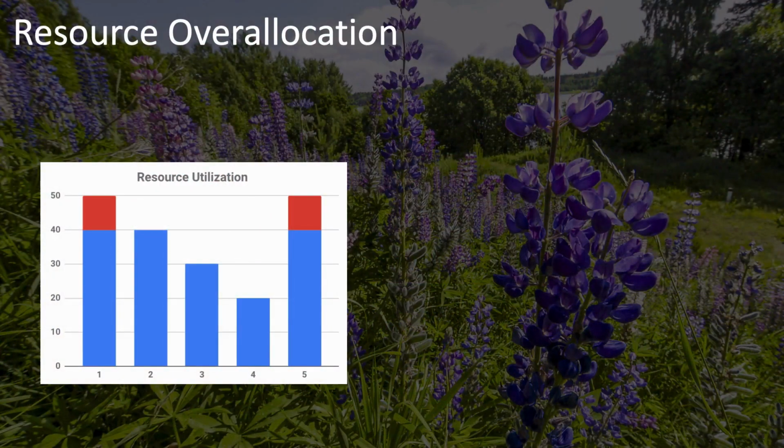Here's a graph that shows an example of resource over-allocation. You should check to see if your software tool will let you visualize this type of resource over-allocation. In this case, we're looking at one or more resources that are over-allocated in these two columns, 1, the first one, and 5, the last one. So suppose these are weeks of time, and that in the first week and the 5th week, you have scheduled this resource for more time than is available.